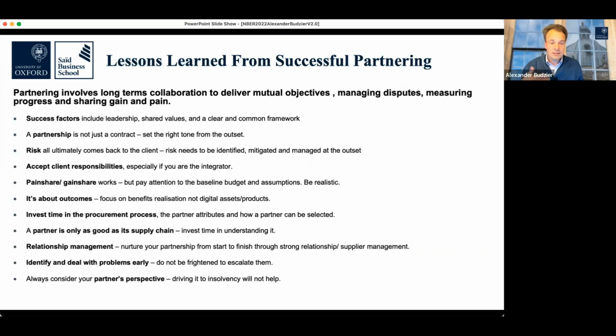We do see that in many jurisdictions, many clients are placing more contracts where they are taking more of the role of the active system integrators, and the typical procurement of going with big turnkey contracts is being diminished. This is also driven by market developments in the last 5 years: if you want to place a lot of risk into the markets, the risk-carrying capability of a lot of engineering construction companies isn't that great anymore.